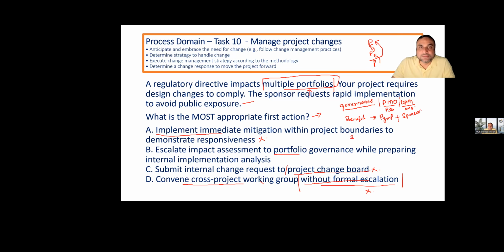If the risks are related to strategic objectives, who should handle it or where should you escalate to? If the risks are related to strategic objectives, then you can escalate to portfolio level. If the risks are related to project objectives, who should handle it?